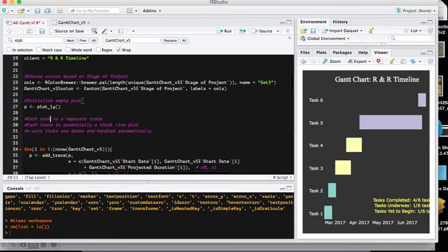So then we want to choose the colors. Obviously, I'm not too worried about those kinds of things. I left them as is, but you could change them to any other types of colors. We're going to push into this colors the RColorBrewer unique type of array. We're going to use 3 different colors because later we're going to base it on the stage. There are 3 stages, so we want to have 3 colors. And then we'll push into Gantt chart color this factor with color labels.